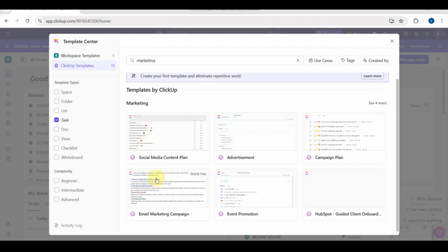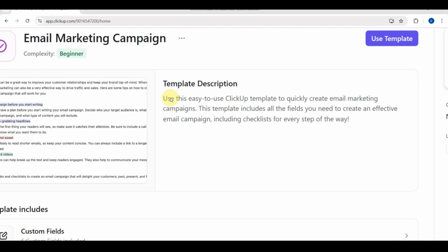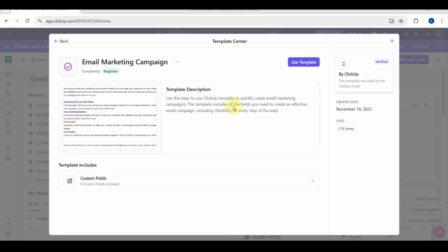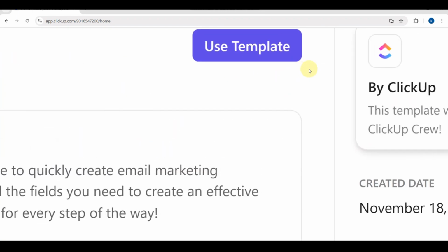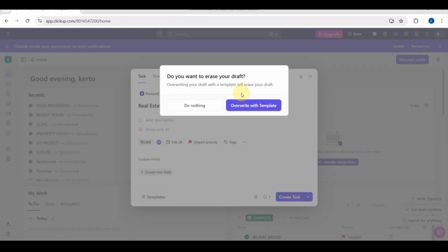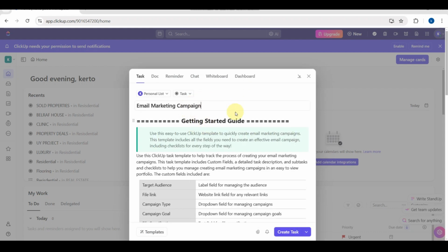So choose what to include, for example, the tasks, statuses, assignees, and the custom fields. So there, you just need to click and access it anytime from your template library. So now guys, you can reuse this structure without having to manually set it up again. And if you manage a team, create standardized templates for common projects so everyone follows the same workflow.